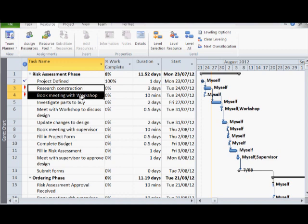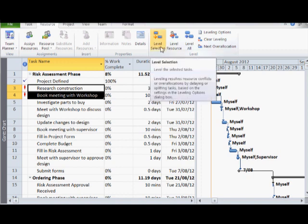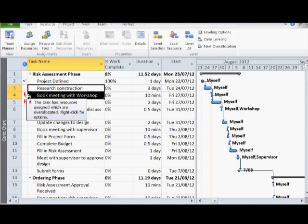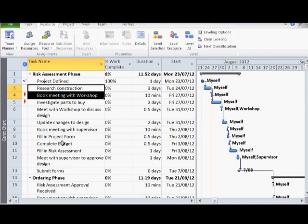In this case, I will select the two tasks that cause over-allocation and select level selection. You will now notice that the resource allocation on research construction is fixed, but an over-allocation now occurs on investigating parts to buy. I will now undo that change.